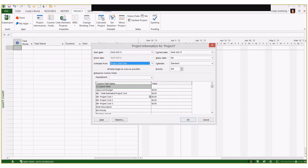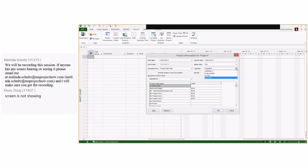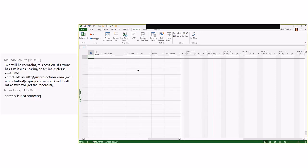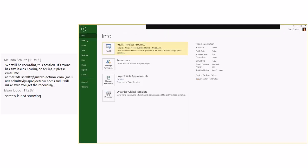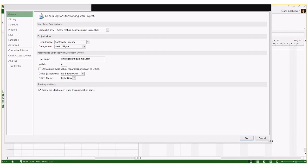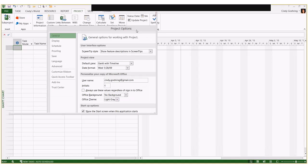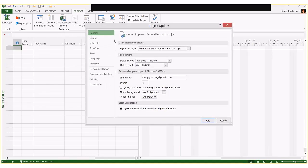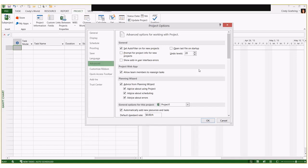Disregard the information on the bottom half of the Project Information dialogue box — that's there because I'm attached to Project Server. Look at your calendar field. I've got a couple of different calendars I could choose from. I'm going to leave the standard calendar as-is for this project. However, if I were going to change to a six-hour-day calendar, I'd go into File, then Options.